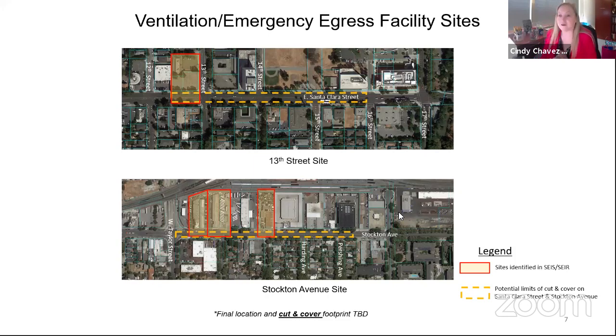All right. Madam Chair, this is Takis. The survey you're suggesting is very important, not only for the reasons you said, but also if we don't survey everything in that particular area, we won't be able to answer the question of right-of-way encroachments and right-of-way takes, which will follow for the engineering design. So thank you for motivating us to work with the city of San Jose to help us with that, and we will do so. Yeah, and that's a great point.